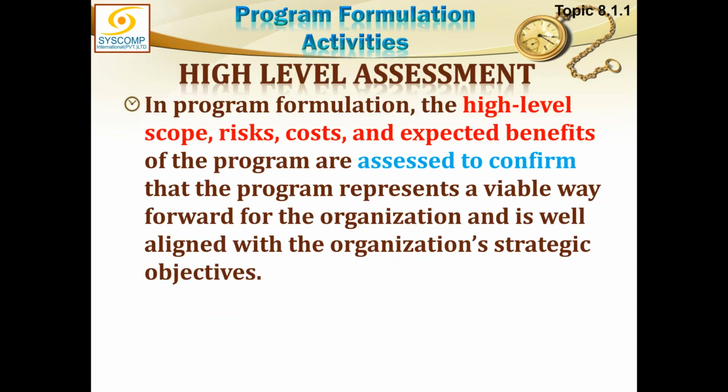In formulation, the high-level scope, risk, cost, and expected benefits of the program are assessed to confirm that the program represents a viable way forward for the organization and is well aligned with the organization's strategic objectives. So in formulation, naturally we are focused only towards the feasibility or the business case, and then issuance of the charter. So here we are only looking at certain domains, and in those domains like scope, risk, and cost and expected benefits, we are